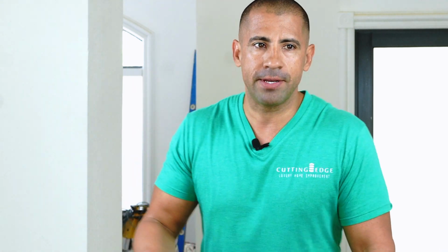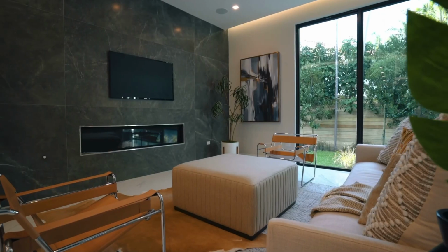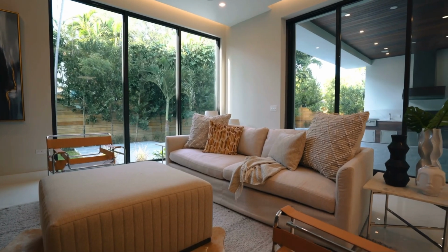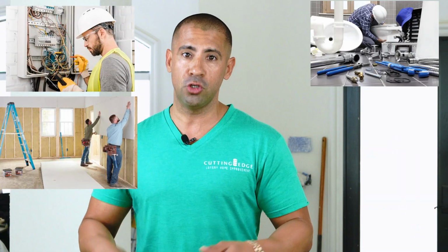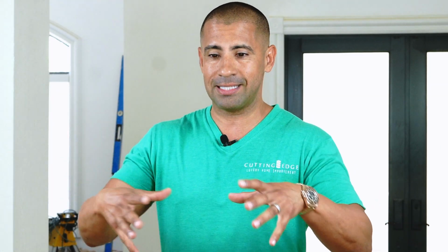Now, figuring out the scope of work, you may say, yeah, I want to change my cabinets, but it's not really just changing your cabinets. A lot of times people want to open up spaces, create new locations, move the refrigerator around, create a beautiful island so they can stay with their families. By just relocating things, it becomes a domino effect, because now you need to do electrical work, mechanical work, plumbing work, tile work, and redo lighting. So it's not just a kitchen cabinet anymore, it becomes a full-blown renovation inside a space.